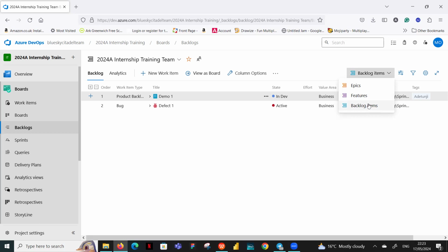I'm traveling will be the epic, is a big one. We need to break it down. What are the things I need to do for my traveling? I need to sort out transportation will be a feature. I need to buy things I'm taking on the journey will be another feature. So you can have different features there. And then under the transportation, you're looking at what are the things you need to do. I need to buy the ticket. I need to look at the dates that I'm going. Those ones will be the stories that are going to come here.